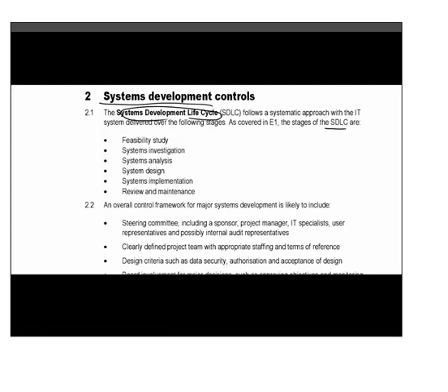So we'll start by recapping the systems development life cycle, which is one of the models that tells you about the different stages you tend to go through in putting a new system in place. So the SDLC says that you start with a feasibility study, and this is when you review the existing system, you look at what you've got in place already, and you start to think at a very high level about alternatives. So what sort of system do you need? What sort of things need to be different?